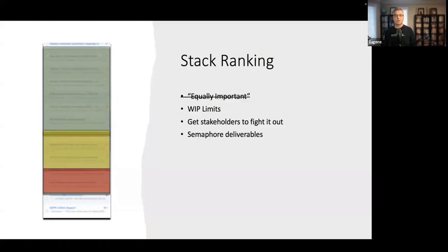So that's really important. And what winds up happening is you get the stakeholders, especially in the situations where a team has multiple stakeholders, you get them to fight it out, right? So you have a stack, and the message I give my PMs is, when I have 4 different PMs who place requirements on my team, right? The message I give them all is, guys, I'm happy to work and I'm happy for my team to work on whatever is the most important thing is. You tell me what it is and we'll work on it, right? No problem. And then they need to go and correlate together about what is the most important thing. So if one PM says that mine is stack rank 1, the others can say, no, mine is stack rank 1. And then they can have that conversation.